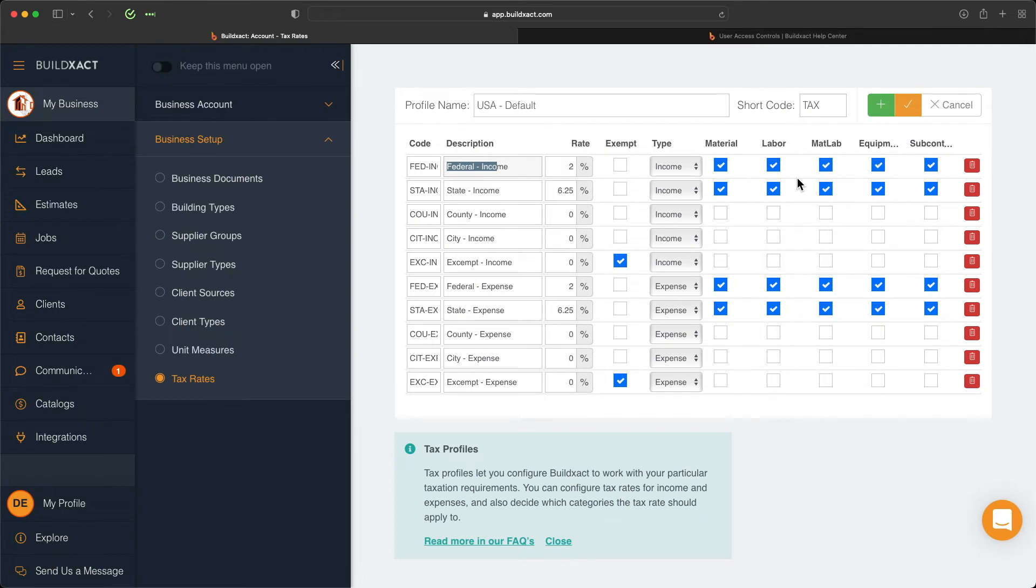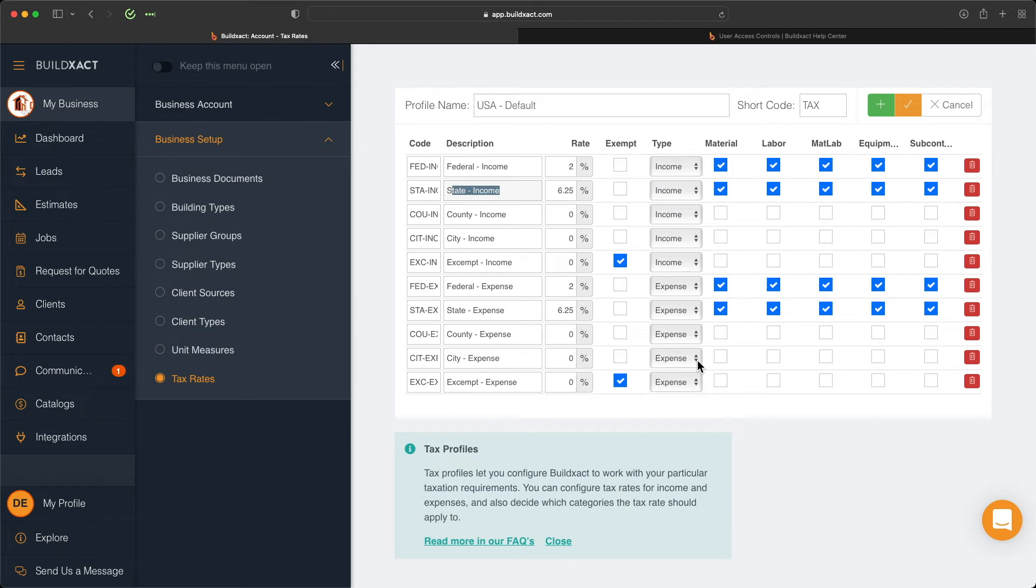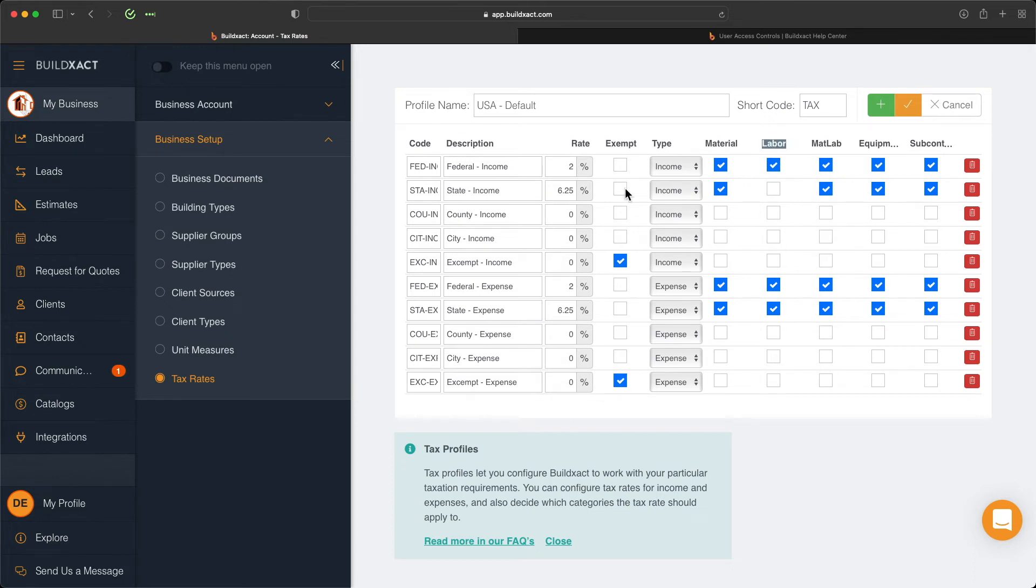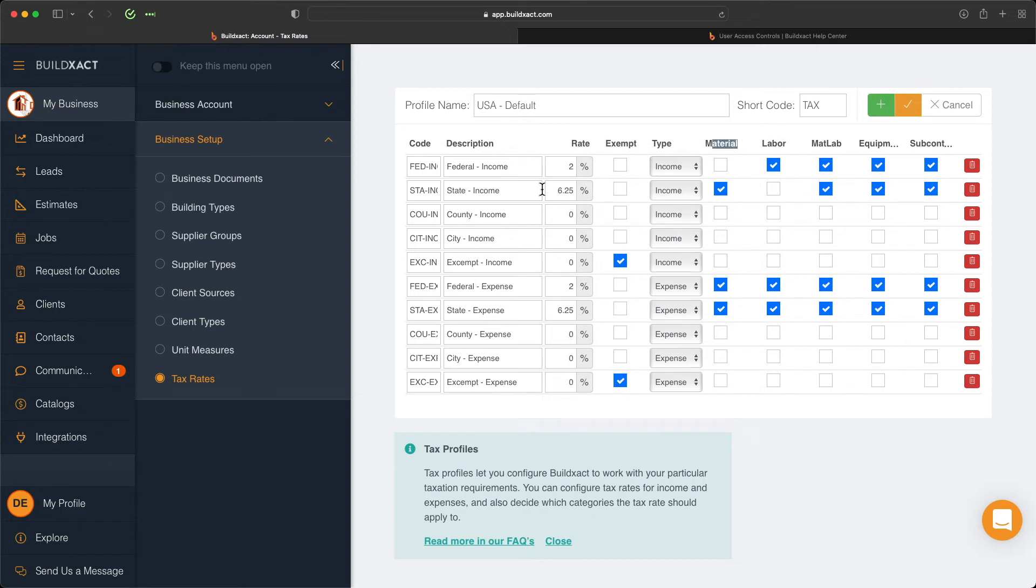The same can be said for the state income tax. Here we're applying a 6.25%, and by default we've applied it to all of these items. Note that this is very flexible. Where you're based, for example, maybe labor only has federal income tax attached to it, so we can deselect it. If that item type is labor, then it's not going to have state tax, just federal tax. At the same time, maybe material only attracts state tax and doesn't attract federal tax, so we can tick that off. Material is only getting state tax and labor is only getting federal income tax, whereas the other ones are getting both.